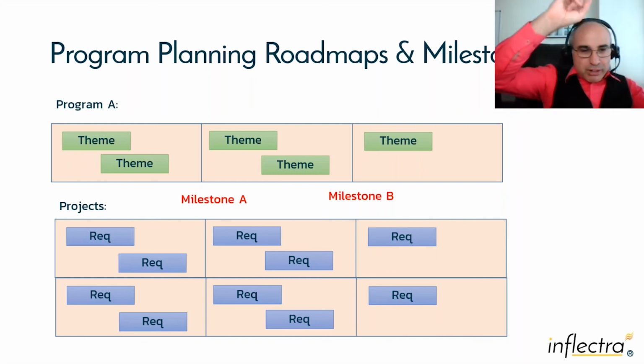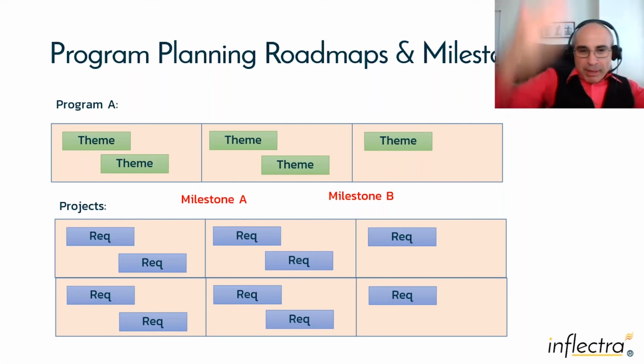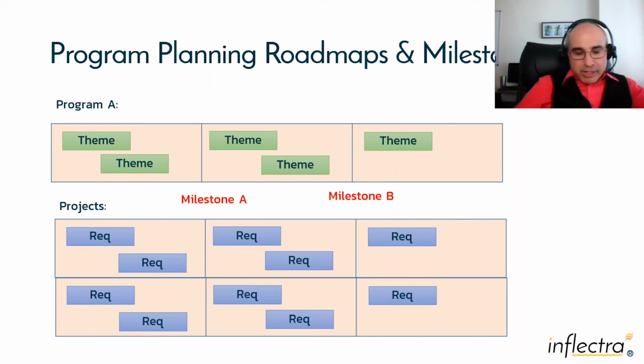And then all your different product releases and sprints will be able to be linked to that milestone, which means you could say end of Q1 as my milestone, I've got to have these 5 releases on these 5 products or whatever it is done by that release. So it's a way of creating milestones across the different products and track completion. And these will tie into the capabilities, the program capabilities and features that we saw on the SAFe model. So with these extra features in place, we will give you full SAFe support across all flavors.